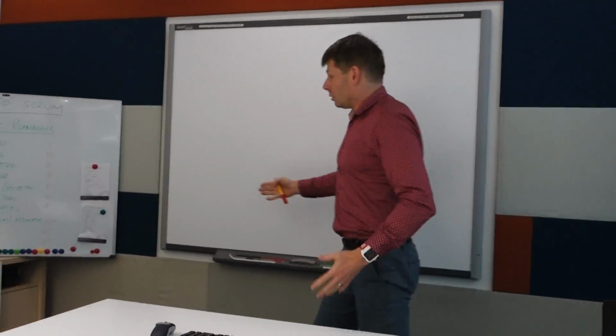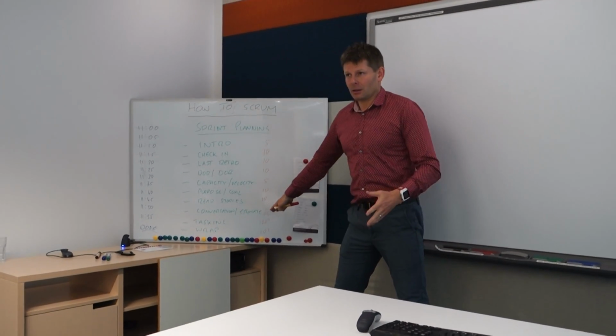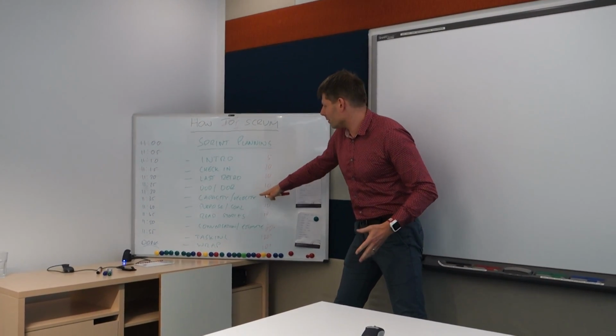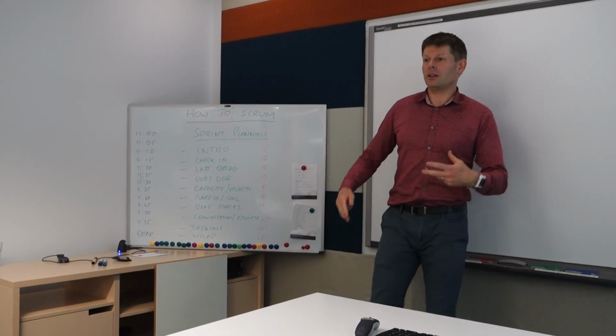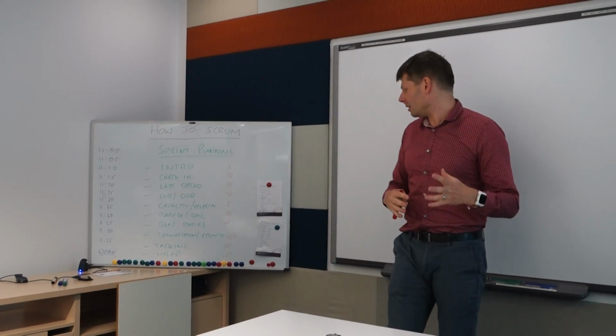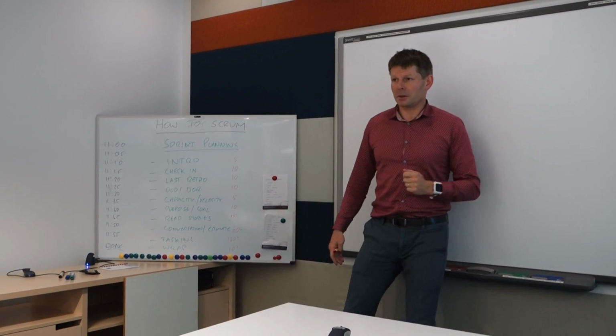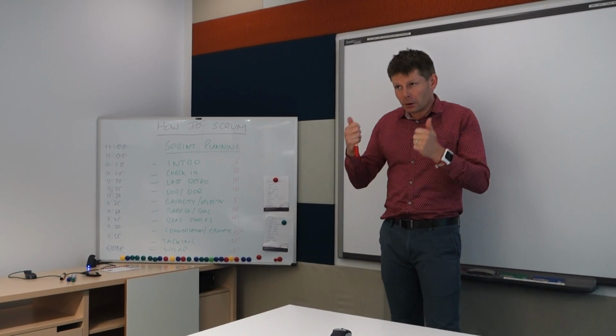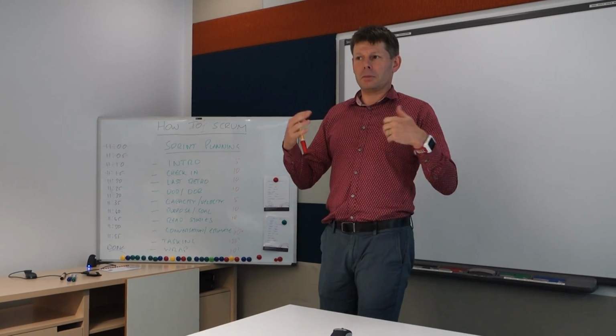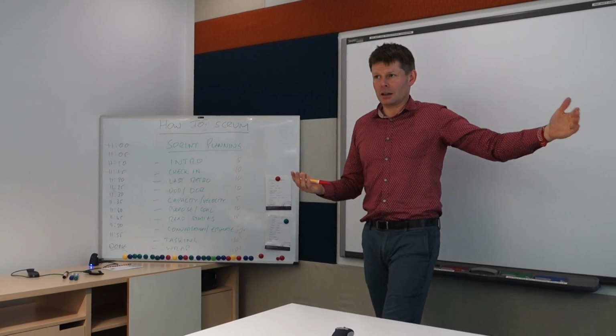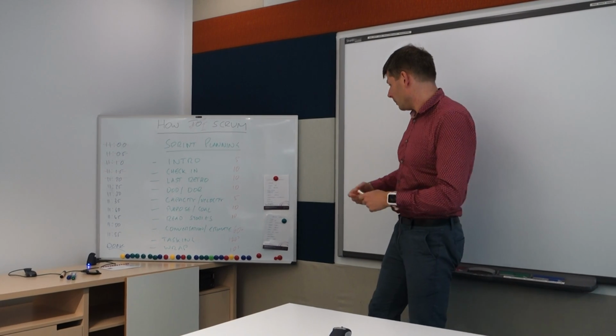And at the end of that, we then confirm that we think, when we've tasked it, that we've got the right kind of capacity. It feels like the user stories are still the same comparative sizes, and that the tasks seem reasonable for what we know at the moment. And remember, we're using the word forecast, not commitment, because we don't want the business to believe that we're guaranteeing an outcome. We're just going to make best efforts.